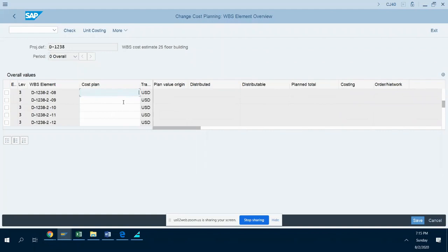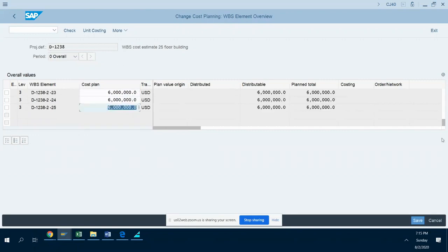See, if there is an inconsistency, it will throw an error. If the total is not matching, or what you distributed is more than whatever planned value, it won't allow you to proceed further. Of course, an error will be thrown. That's what top down means. You have to look for consistency. Whereas bottom up means you just add the lower values, whatever is there. You don't have to even worry about what values are appearing there, isn't it? Are you getting what I'm saying? Bottom up, you don't have to do this much, if at all you wanted to.